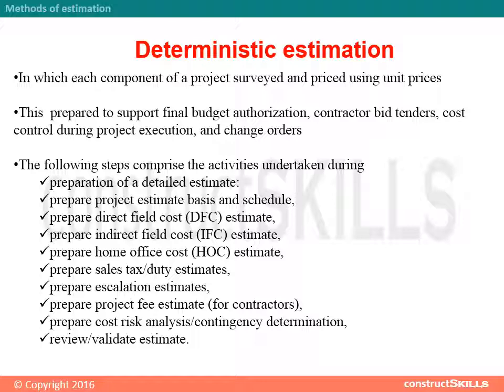The following steps comprise the activities undertaken during preparation of a detailed estimate: Prepare project estimate basis and schedule; prepare direct field cost (DFC) estimate; prepare indirect field cost (IFC) estimate; prepare home office cost (HOC) estimate; prepare sales tax and duty estimates; prepare escalation estimates; prepare project fee estimate for contractors; prepare cost risk analysis and contingency determination; and review and validate estimate.